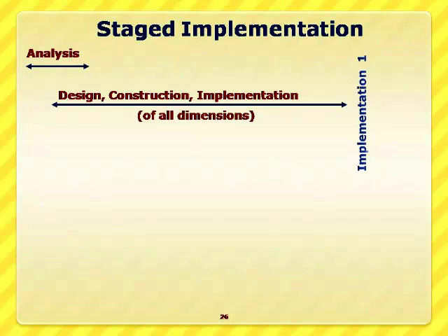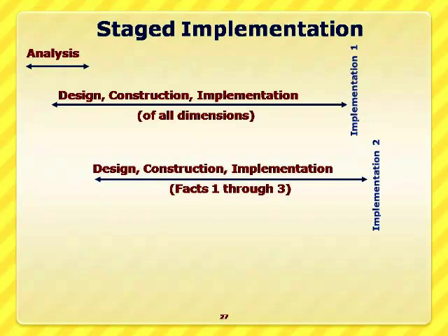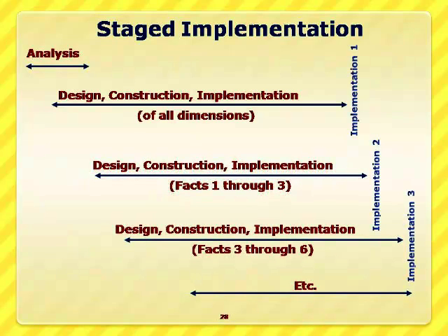Therefore, all dimensions have to be comprehensively collected, analyzed, and implemented at one stage. In the next stage, we design, construct and implement a few facts, let us say facts 1, 2, 3. See the results and learn the mistakes from this implementation of a few facts, so as not to repeat them in the second step.